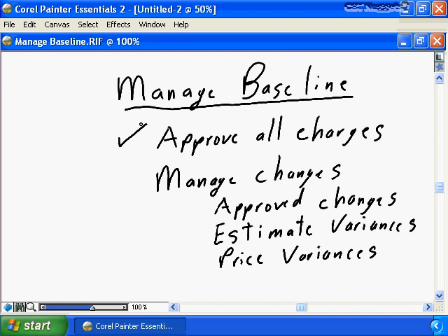If the charge is inappropriately coded, the charge is going to go against my project. Therefore, it's important that you review all charges. Let me repeat that: you review all charges against your project to ensure there are no errors, to ensure that all of the charges appropriate to your project are being charged to your project, and that only the appropriate charges to your project are being coded.